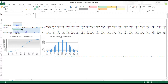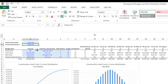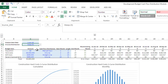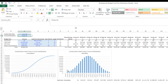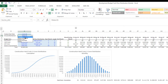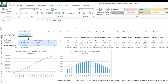I'm going to walk you through how to use it right now. The first input is your analysis start date — I'm going to make this January 2016. The next is the steepness of our S-curve. What this does is, using a standard deviation in our normal distribution formula, we get a certain curve shape. I'm going to use moderate here — that's a 3.